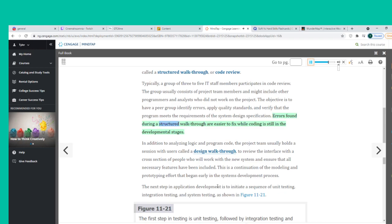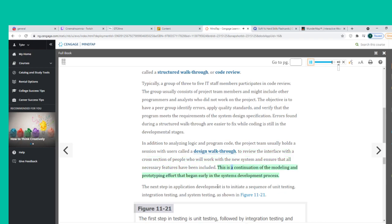Errors found during a structured walkthrough are easier to fix while coding is still in the developmental stages. In addition to analyzing logic and program code, the project team usually holds a design walkthrough with users to review the interface with a cross-section of people who will work with the new system. The next step in application development is to initiate a sequence of unit testing, integration testing, and system testing.